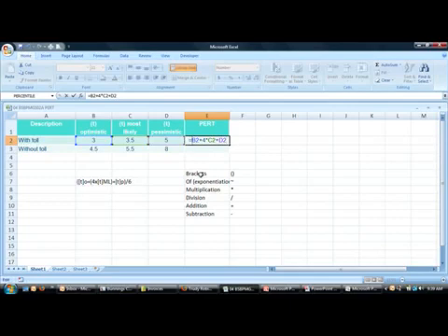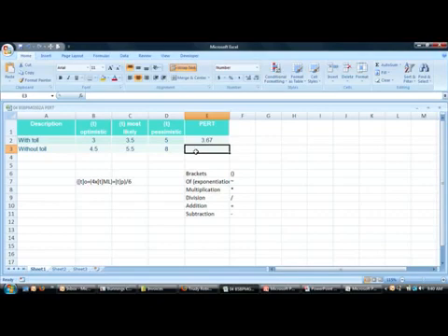based on the BODMAS theory here, we would need to put this formula in brackets to make sure that this occurs first prior to the division of 6 being undertaken. And we can see that the PERT analysis is 3.67. If we calculate the same for the without toll, we can see that the PERT analysis is 5.75. This obviously depends on the variations between those three figures.